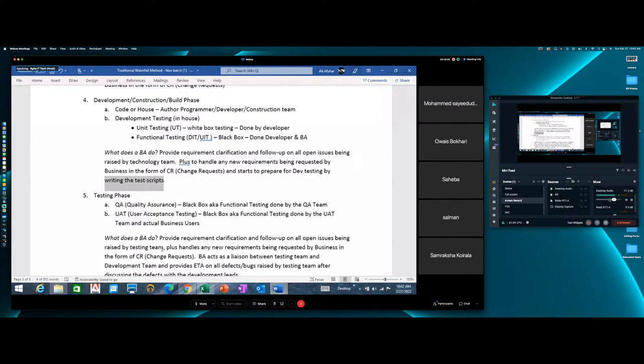Right. So on a weekly basis, you may be getting together with all the different tech leads and telling me, Ali, basement development is at 20%. Ali, basement development is at 40%. Ali, framing is just being initiated. We have already received the material for the roofing. Such and such day, the guy is coming in to put in the windows. We have the heating and plumbing guy coming on this day. We have the electrical team starting on this day, and we're expecting them to complete it by this day. This is a project plan.